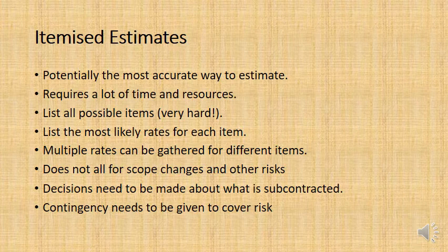And if it's a risky project, meaning it's a project that you haven't done, it's very unusual, you haven't done a project like this before, then the contingency value needs to be higher. If it's a fairly straightforward project and you've done lots of projects very similar to this before, then the contingency value can be less.